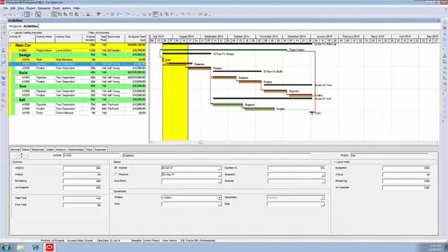We haven't started yet, which means we haven't finished. We'll push to the right of our current or new data date. So we've started, we haven't finished. How many days do we estimate are remaining? Well, we've slipped by 5 days, so we've gone forward a month, so we anticipate that there are still 5 days remaining to be done. We put that in, we enter it, and the computer works out that we've done 75% of the job.